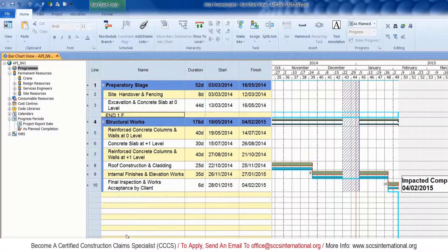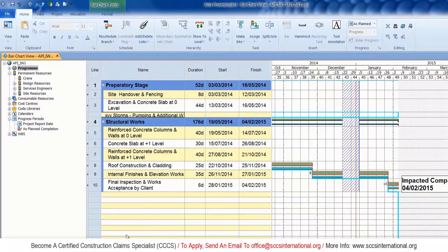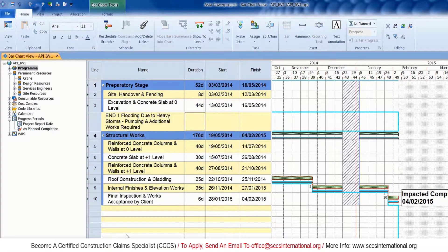We will split the activity and then link the fragment — which is a delay event — to the affected activity. Please follow the steps shown on screen. I've inserted a new activity and I'm typing up the first delay event, which is flooding due to heavy storms.